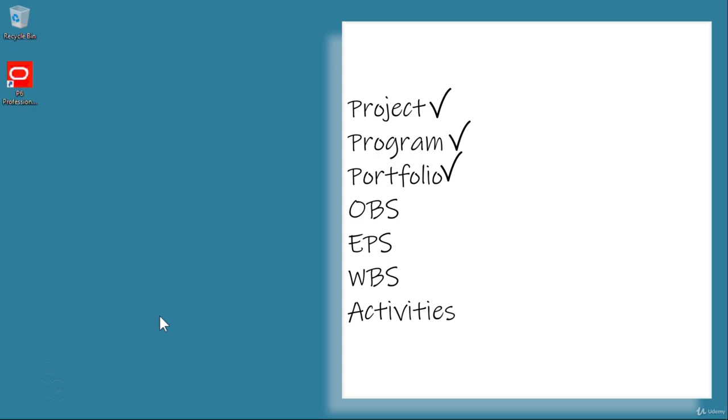OBS is an organizational breakdown structure. We said that OBS is a hierarchy. It's a hierarchy of people responsible for doing the project work. We break down the OBS into divisions, departments, teams, and the team members.